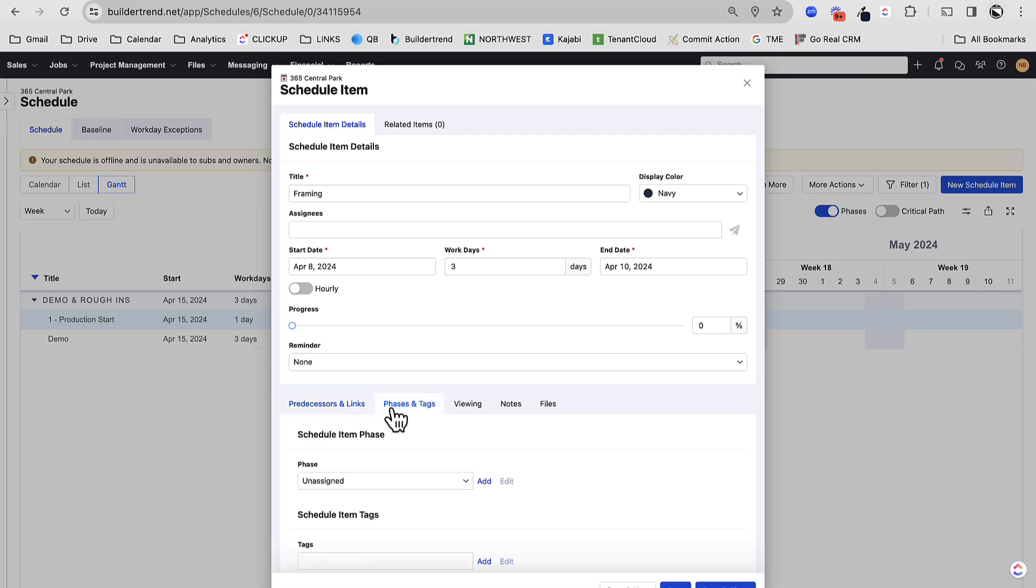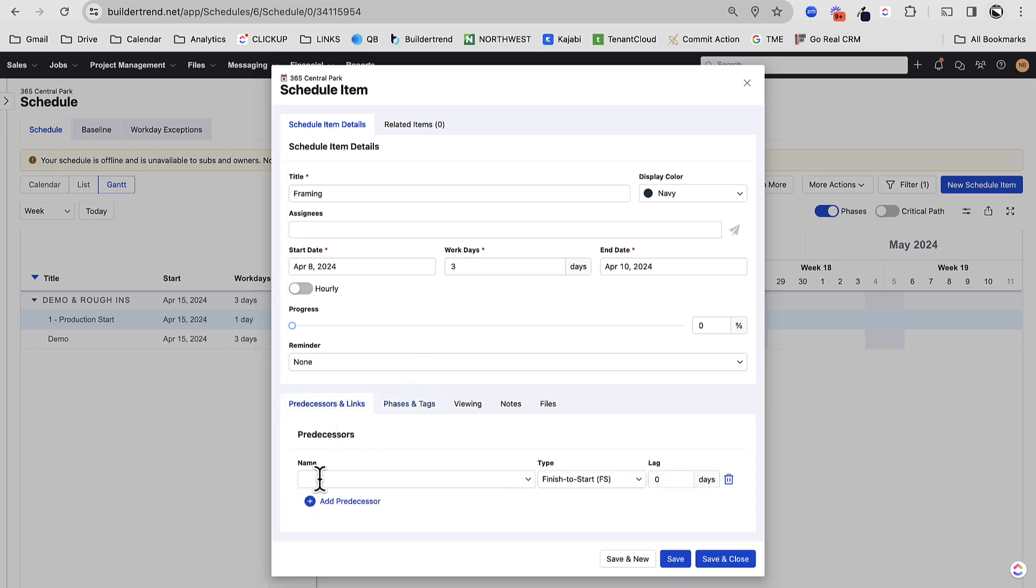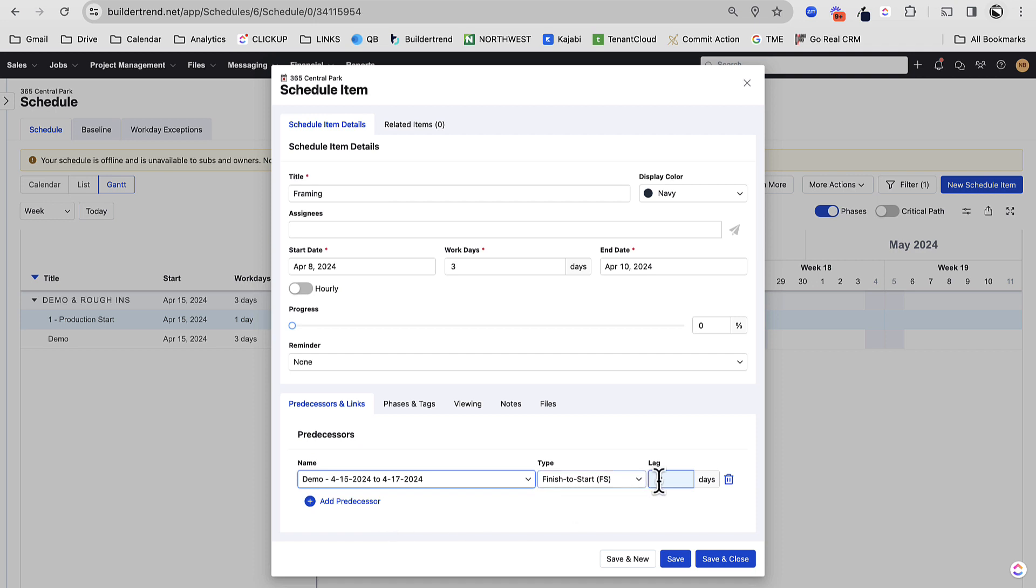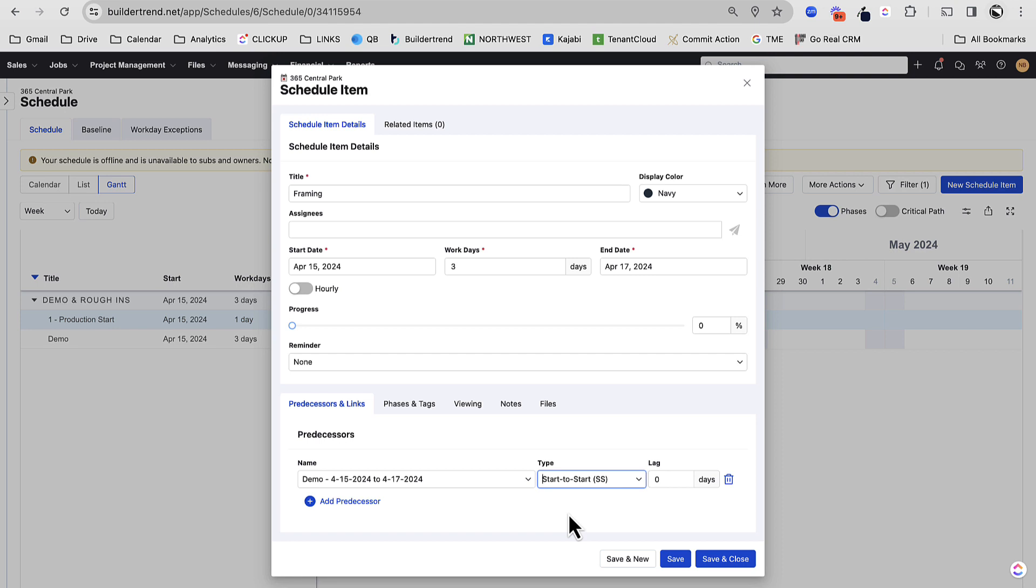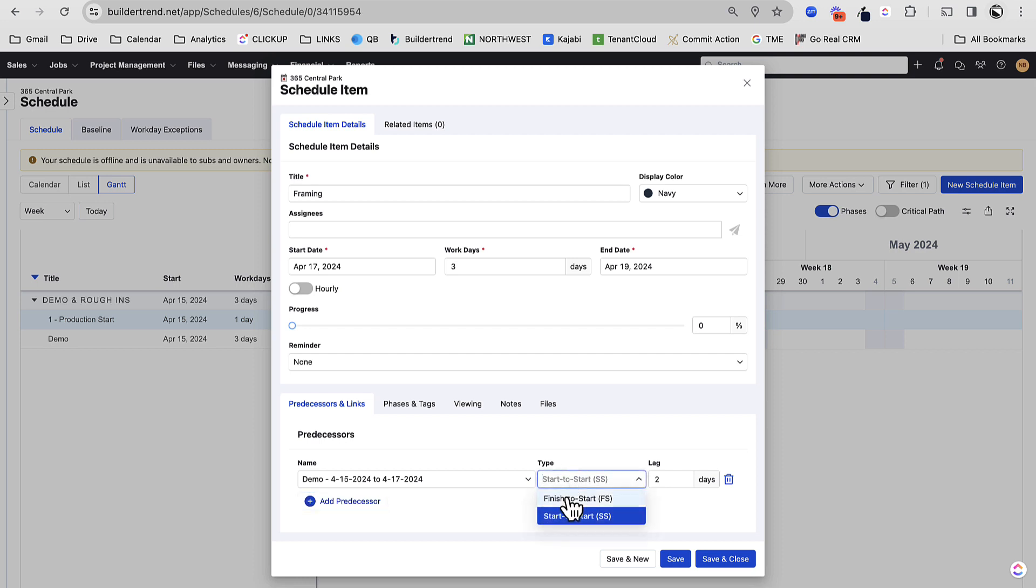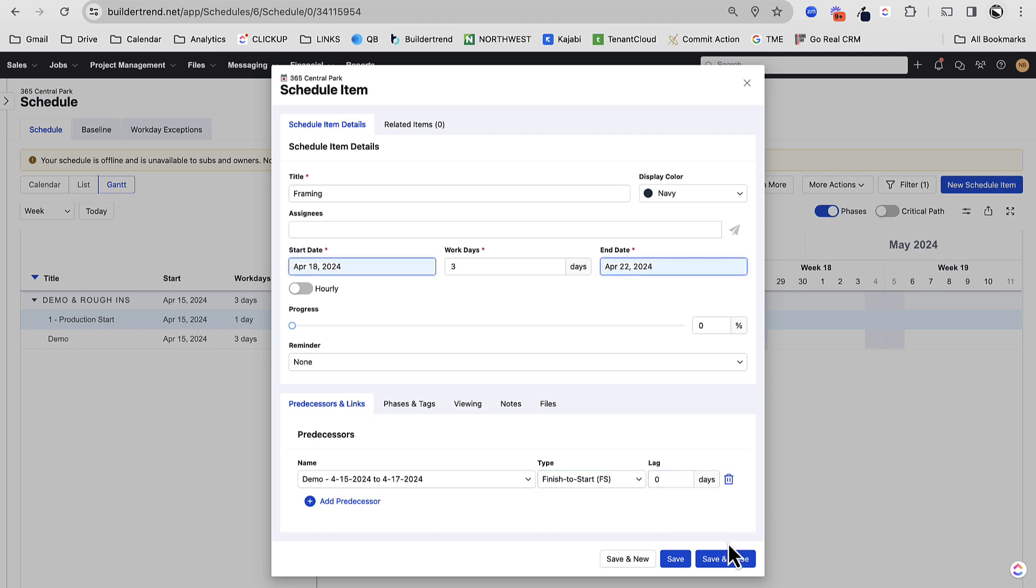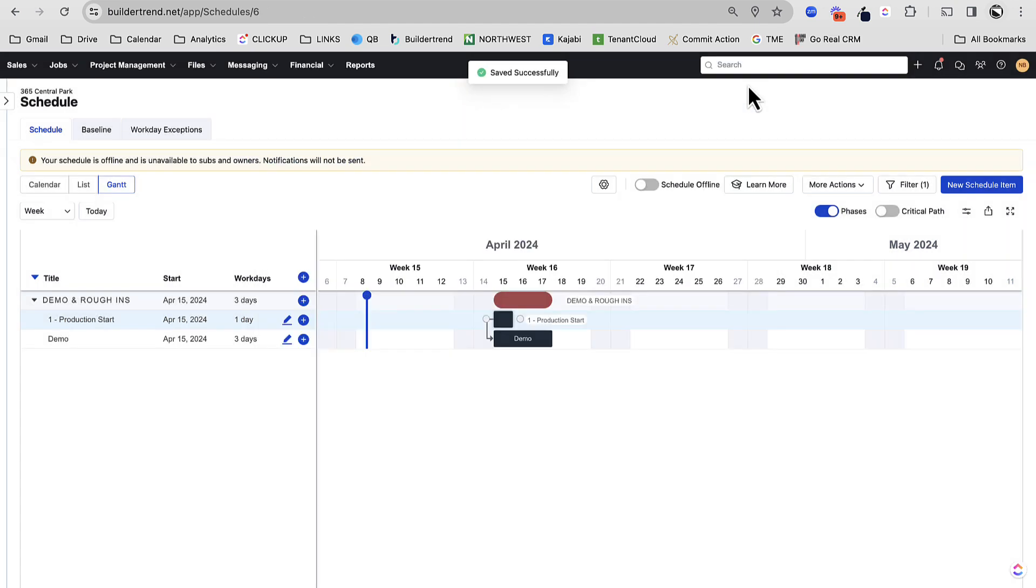I'm going to create another scheduling item. Let's just call this Framing. Let's say three. And I'm going to assign this to demo and rough-ins, and I'm going to make this dependent on demo. Now, these are finished to start, so meaning when demo finishes, my framing would start. If I made this start to start, it would mean when demo starts, my framing can start, but that's not the case. It might be the case, sometimes we use start to start when something starts, and maybe I can start the next task two days later than it starts. That might be possible, in which you could do a start to start with like a two-day lag. But for this, I'm going to do finish to start. Once my demo finishes, my framing can start on that day.